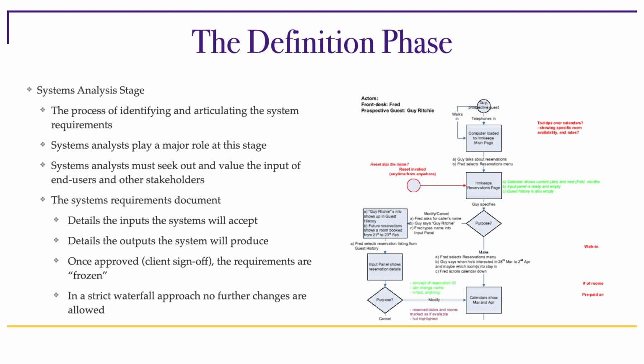Depending on the complexity of the system, this could be a very lengthy phase with a lot of back and forth. The objective is, at the end, to get to a point where the requirements are established in a requirements document and the client signs off on them, meaning reads them and says, yes, this is exactly what I would like.